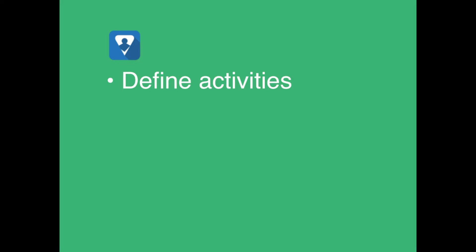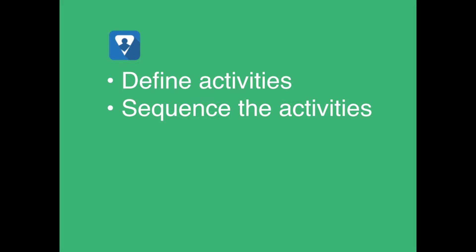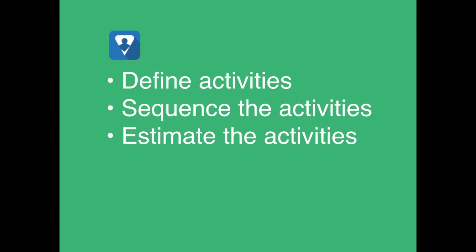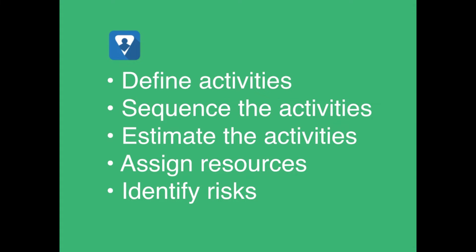And therefore you would repeat the work breakdown structure process in an iterative fashion. So why is it so important that we define the activities properly? Well, consider what we do with these activities: we sequence the activities, we estimate the activities, we assign resources to those activities, we identify risks that are inherent to each of the activities.